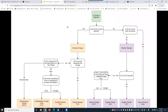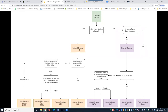This diagram or workflow is what you want to think about when you have to create a change — what is it that you want to do? If a change is required, does it affect the owner's contract — the contract we hold with the owner — or is this an owner cash allowance? This differentiates whether it's an internal change or an external change. An external change always affects the prime billing; an internal change does not.